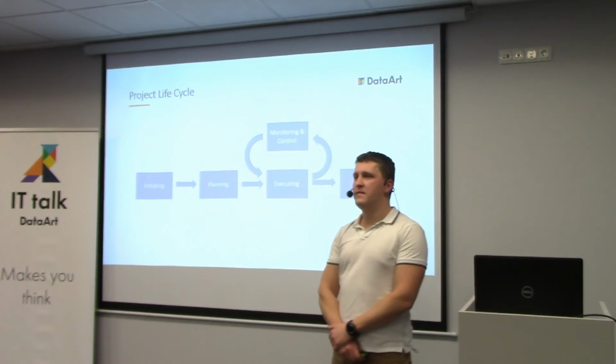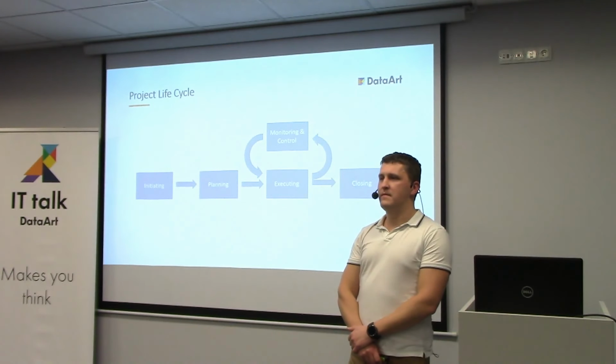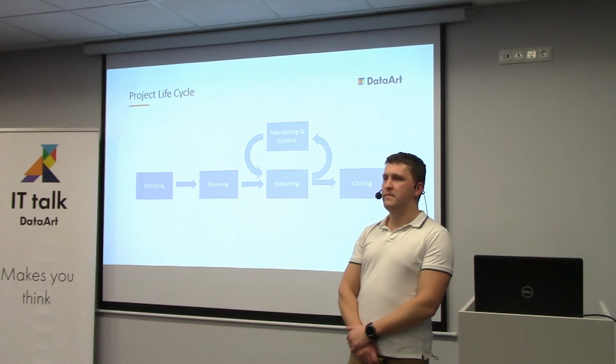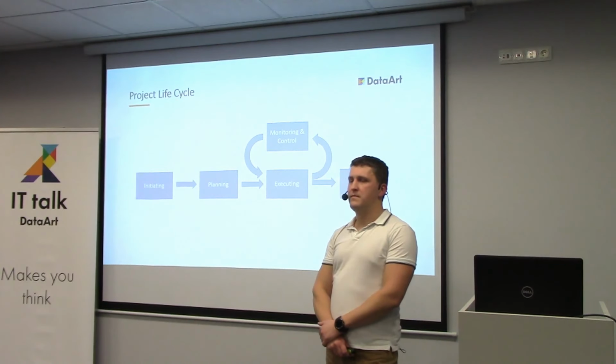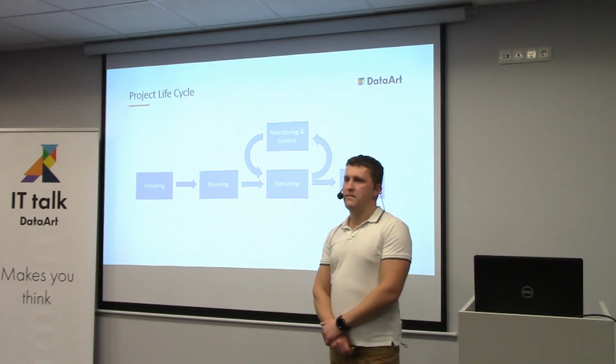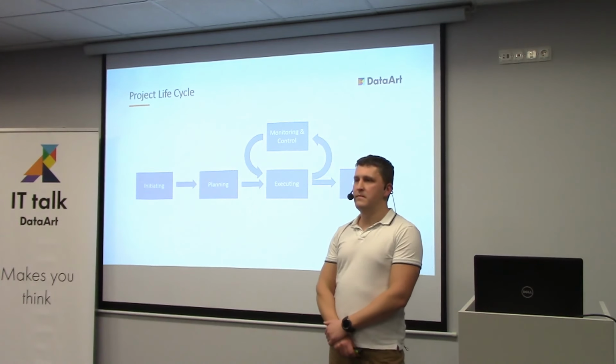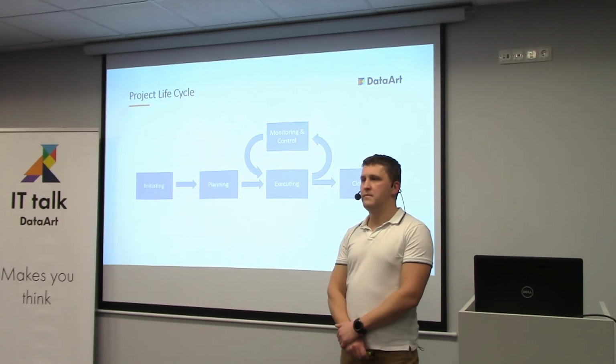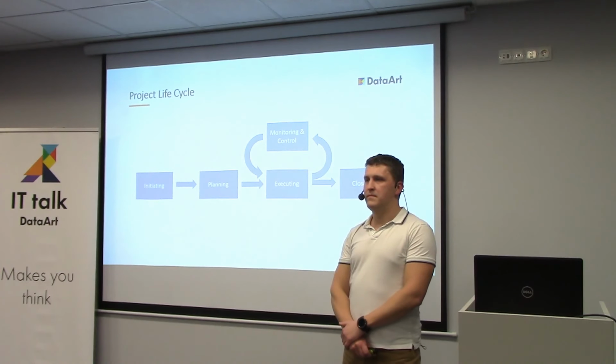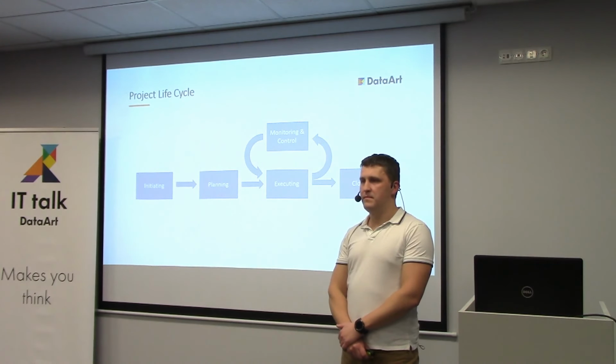The main difference between this approach and an iterative approach is that the feedback line goes back to planning. Because in Agile, after a sprint, you do a retrospective, you go to the product people, they figure out what to do, and you replan the whole thing, and then you execute. In this approach, the monitoring and control is about whether things are going right or wrong, and if they are going wrong, you make adjustments to get the project back on track, but you do not replan it.